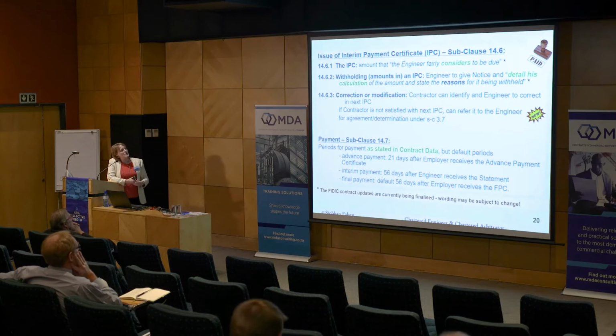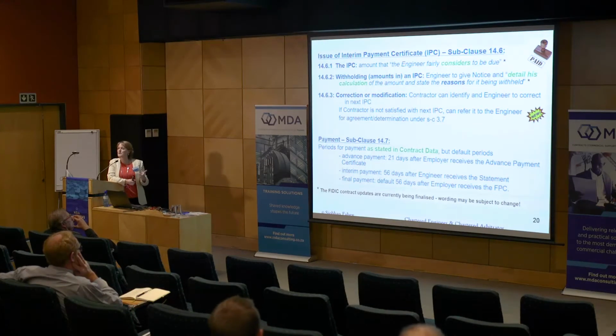And so then we get on to the engineer's obligation to issue an interim payment certificate. And I'm sure it's the case here, but I'll just remind everybody that in England, Ireland, America, common law jurisdictions, the engineer's certificate, I can't remember which court case it was now because I'm not great at the names of court cases, but there was a recent court case that basically emphasised that an engineer's certificate might as well be a bank cheque for the contractor.